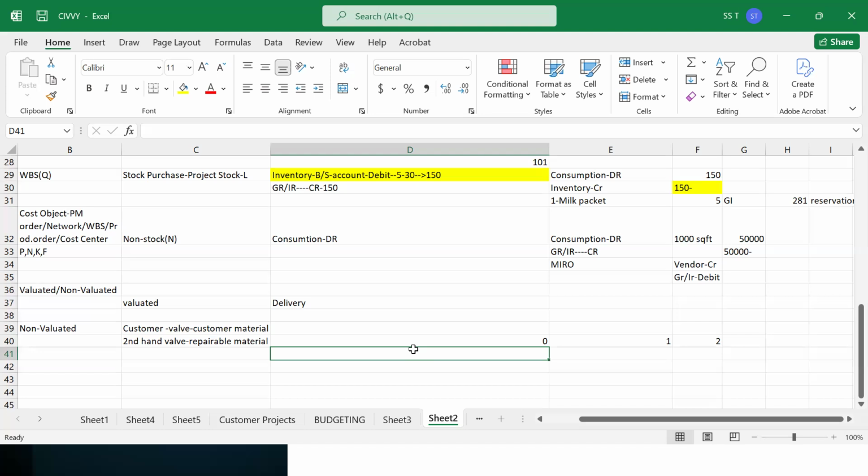That means you need to spend whatever amount is required for providing the service, like erection and commissioning of a power plant or substation, whatever the project may be. The contract says monthly you need to submit the running bill, showing exactly the cost incurred with proof. Then I will give you a 10% margin on top of it. Understood? Those kinds of scenarios also exist, but I never did such scenarios, to be frank.